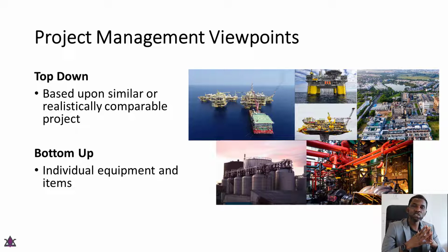For example, people who have been in the field for so many years have experienced so many projects that they know, let's say if you build a platform of 100,000 barrels per day and a platform of, let's say, 75,000 barrels per day, or let's say 10,000 barrels per day, they actually know how much it costs for, let's say, a fixed offshore platform. They know how much it costs for the 10,000 barrels per day and 100,000 barrels per day. So at that level, they are able to make decisions as to how much is typically going to cost for a 50,000 barrels per day facility. So that's looking at it top down.